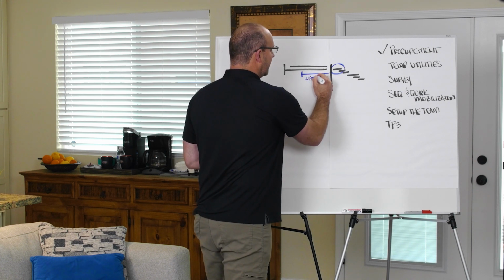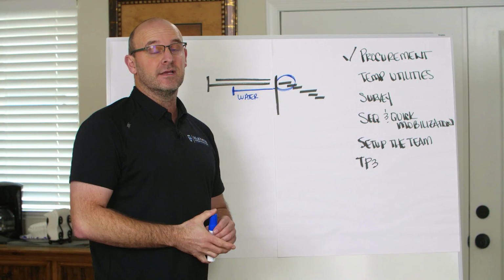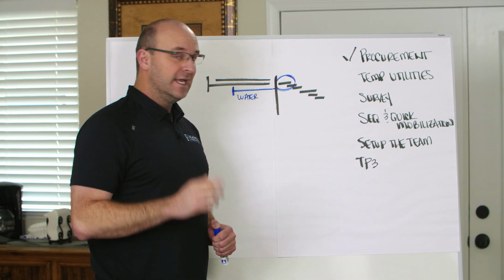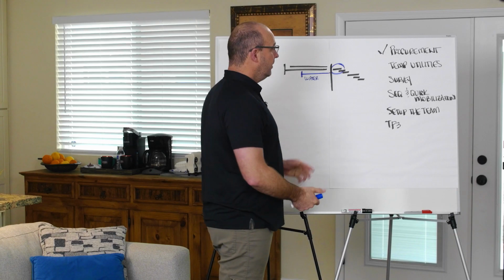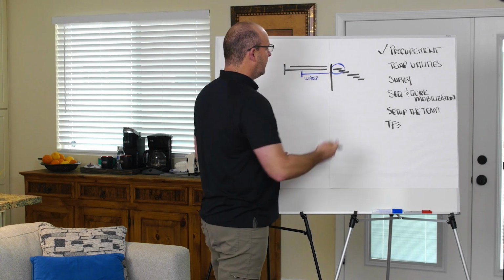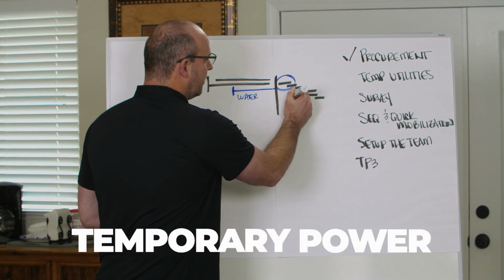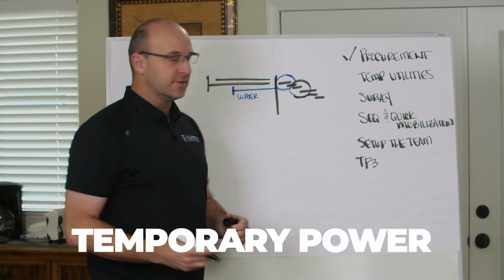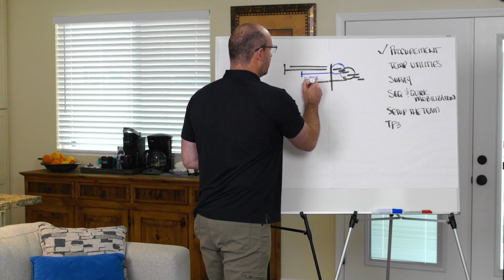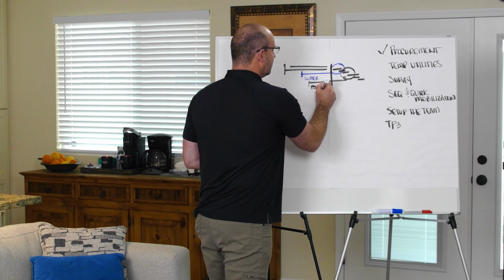We also have dry utilities, right? We have the communications, so your internet, and we have temporary power for your project site if you're not going to use generators. So when I talk about temporary utilities, I want to make sure that you have your water, and then you might not need temporary power right away. Maybe you need temporary power before you start your foundations. I want to make sure that you have both of these tracking properly so that you have them on time.